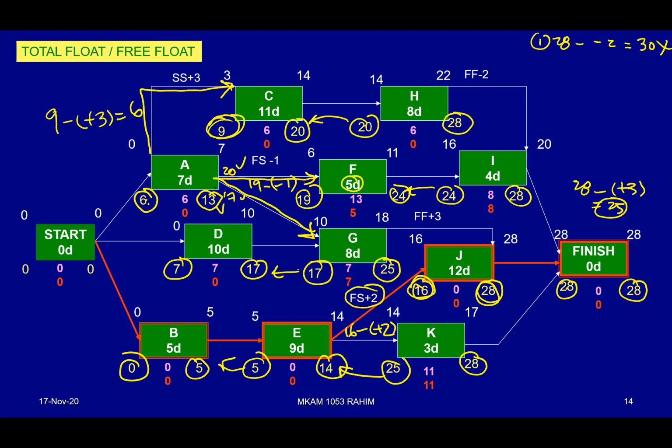Which is the smallest value? For sure it is 13. So 13 is the value that we actually want. How do we get that 13? It is basically from the going back arrow from C. So 13, 17, and 20 are the ones that we wanted to compare, but the nature of the arrow is coming back from C, from the front. So that's why we need to identify what is the value for the late finish first.